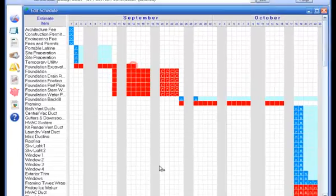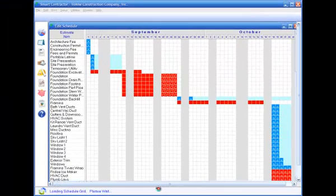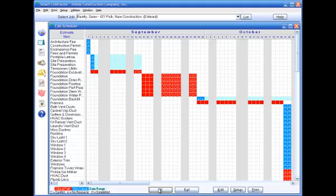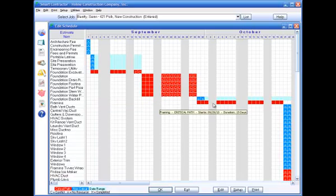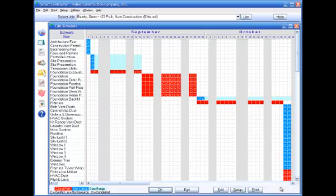When you make changes to the schedule and click OK, the program will automatically regenerate and display the schedule. If you change the duration of any critical path items, all of the dates that follow are automatically rescheduled.